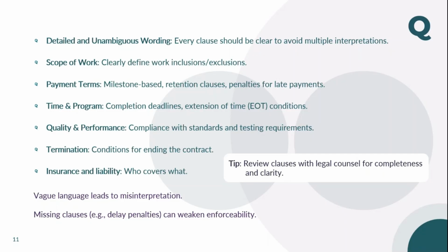Secondly, you will understand contractor has to consider, employer has to provide money, employer has to ensure the right of access, and as an engineer, he should review the drawings, review the shop drawings, provide access, approvals, everything you are to check and verify. That is the second thing. Okay, so first thing what I'm talking about is basically the required mode of definition. Then you have to mention the parties' obligations are rightly identified and included in the contract. So now obligations are clear.